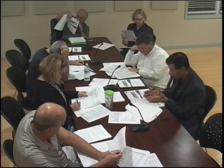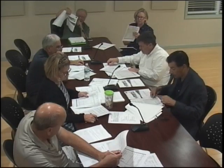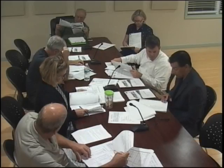That assumes we approve the change order. That assumes this change order. There's still some items pending. They're in the planned and not committed. So they are categorized in there, in the contingency. So you've got $167,000, and we've probably got $20,000 to $30,000 in our pending contingencies. Our pending right now is $27,815. That would go against the 167.